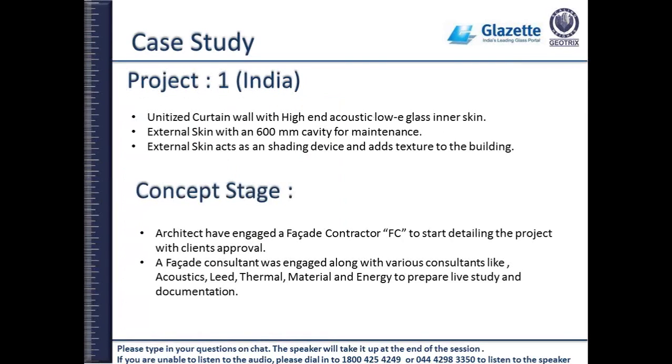As you are aware, once you finish the structure, the next critical component, a structural element of a building, is the main facade of the building. But unfortunately, we don't put too much emphasis on it today, we leave it to the fag end of the project, and we suffer, where we have to rush the projects and cut down the time frames. So we are not allowing enough time for anybody to achieve the dream of the visionary, who is the architect, who is the designer. So how can we get over it?